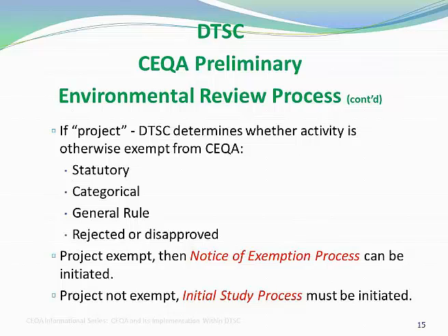Drilling in and of itself may seem like a benign activity if this appears to be some abandoned area that's devoid of any obvious resources. But consider the fact that in California we have many instances where cultural resources may be buried below the surface, and also habitats can sometimes be in places that appear to be very barren. So the answer to that question, if you have a work plan, yes, you need a CEQA evaluation on that work plan. And again, please contact our office initially for consultation.